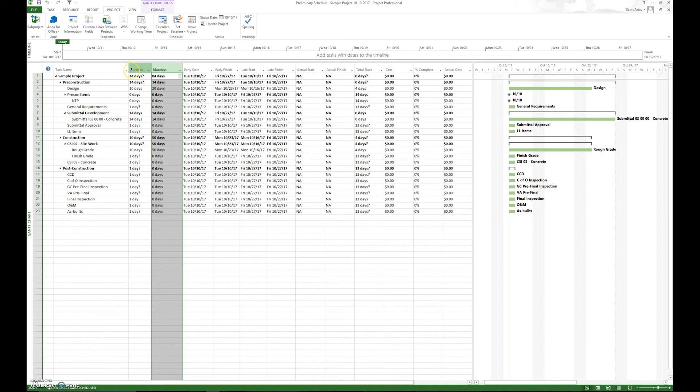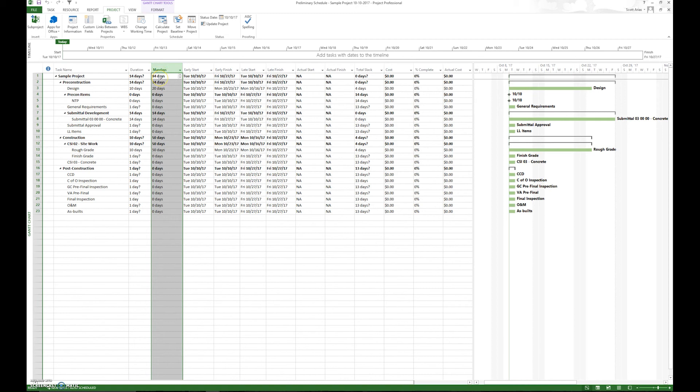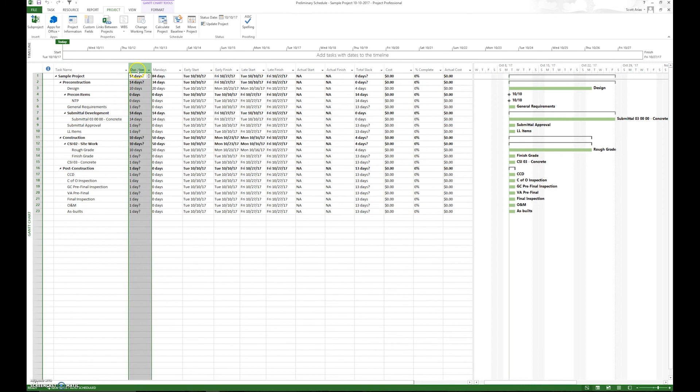You don't have to do that for the duration column because it automatically shows the critical path duration. Not the sum of duration. Man days on the other hand is we're rolling the information up and summing it. So we're going to get the sum of duration days. So big difference between duration and man days. This is the critical path. This is the sum of duration, sum of man days.